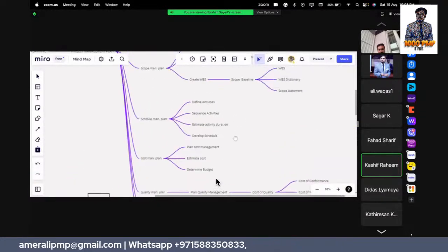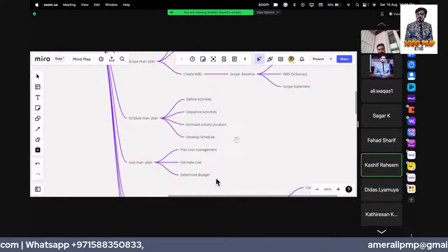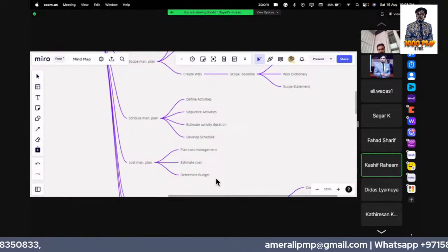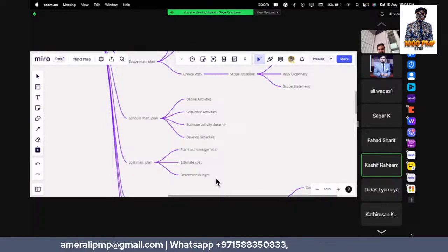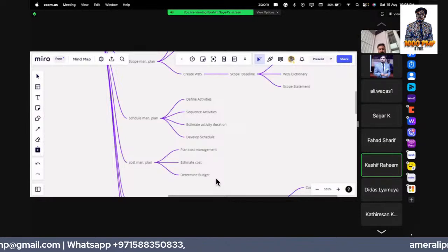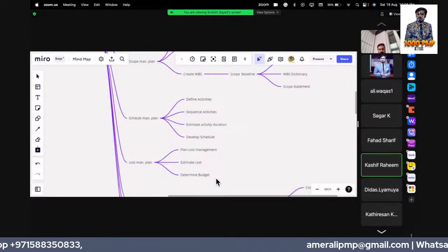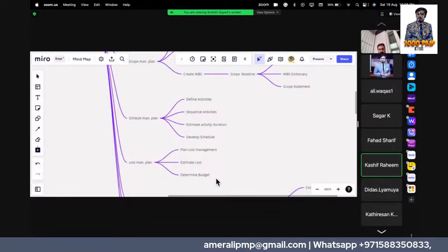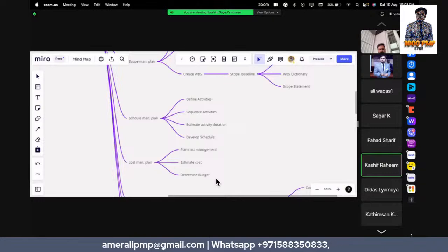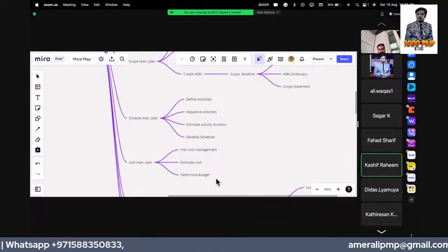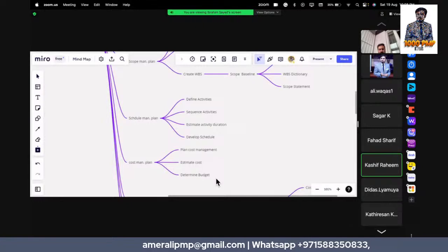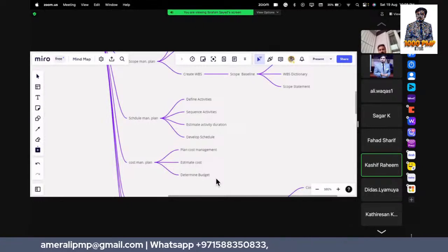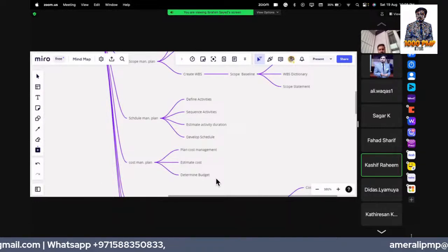Schedule achievement. Yeah. Here, when we have the activities, we will first make the WBS, and we'll be assigning the scope to the WBS, and the estimation of the duration of activities will be planned under the WBS. Then we have a sequence of the activities, what activities would come first and second. Then we have the activities' predecessors. We will be deciding the dependencies of the activities as finish to start, start to finish, finish to finish, and start to start.